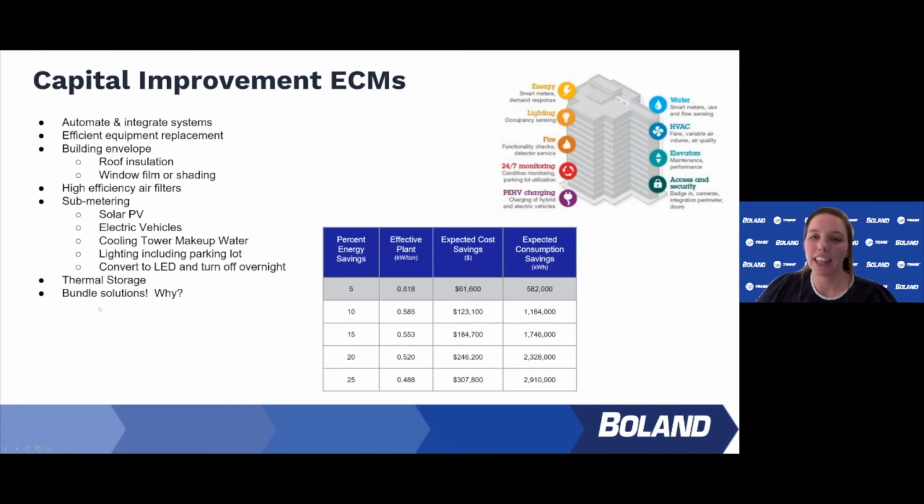So here's the thing, every ECM is going to have a payback because you're saving energy, right? However, those paybacks range tremendously. We were talking about building automation system sequence changes. Those are going to have a really quick payback. Lighting is going to have a quick payback. Replacing an old chiller with a new chiller is going to take more years to pay back than making some small changes to a sequence, right? However, you might need a new chiller. So that's one thing about all these ECMs.